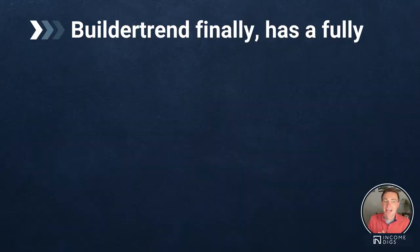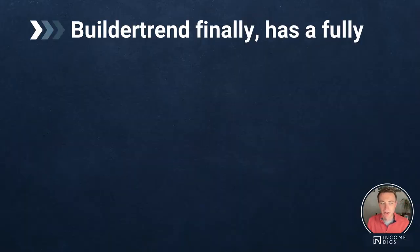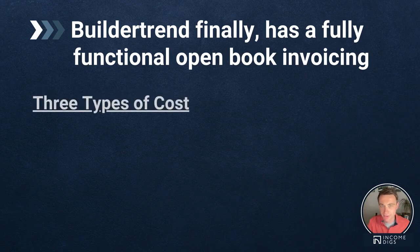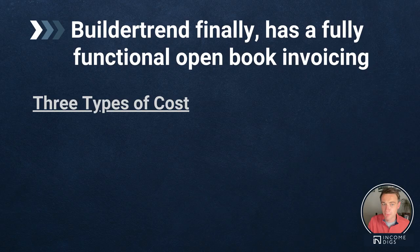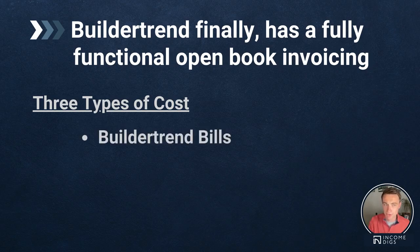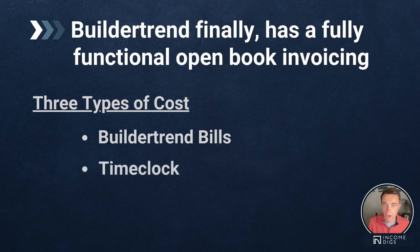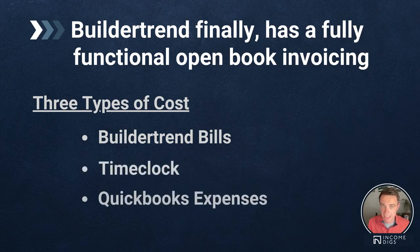So when we talk about open book invoicing, BuilderTrend finally has a fully functional system. What we're going to do is bring in the three different types of costs. This is what I do. I do these three different types of costs. You can bring in others. I'm going to bring in my bills from BuilderTrend, my time clock, and my QuickBooks expenses.